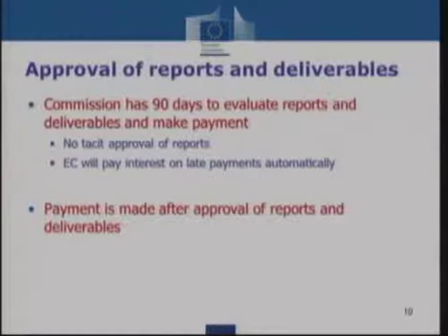So we know that sometimes there are constraints, and there we try to see whether the PO and the coordinator can come to an agreement in which, before the 60 days have expired, you are in a position to send already, maybe not the final, but a very good draft of the periodic report, which is the basis for assessing the work.